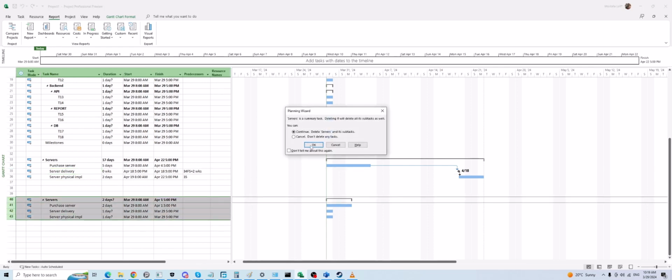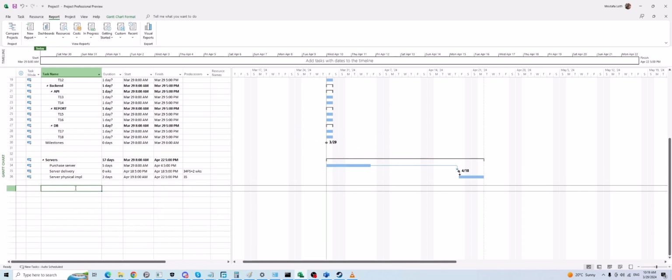But even if you should not be involved at any level of infrastructure for the server, you need to mention as a milestone in your project plan that on this date the customer is going to provide access to the servers, because you need that date to implement your software. Otherwise, you cannot deliver the project.